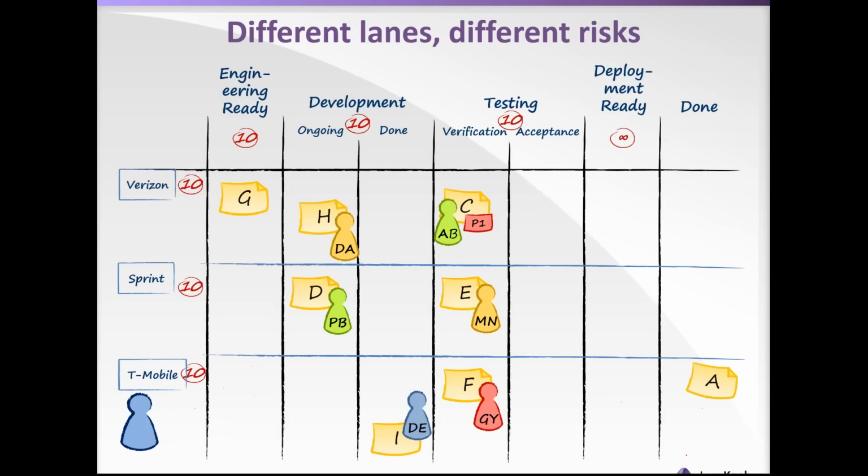And that might manifest itself on our Kanban board, where we literally put lanes on the board for the different customers, and the tickets in each lane receive a different class of service. So we've directly tied the strategic position of our customers, we've clustered our market segment, we've understood what the customers care about, we've defined fitness criteria metrics, we've made those our KPIs, and we've changed our Kanban board design and allocated capacity and defined classes of service for how tickets are pulled through the Kanban board to align with customer expectations.